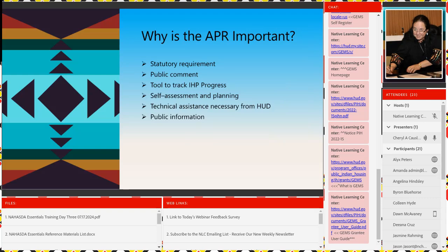Okay, so this one I searched on for a long time. Can't find it. Called the HUD offices, called 3 of them, I think, and they all told me the same thing. The sweet spot seems to be 2 weeks. You're supposed to make it available to the public for comment. So now when you're looking at APRs due on this day, you've got to back it up that far for public comment, and you've got to back it up again because your governing body needs to approve it. So this due date becomes probably at least a month earlier.